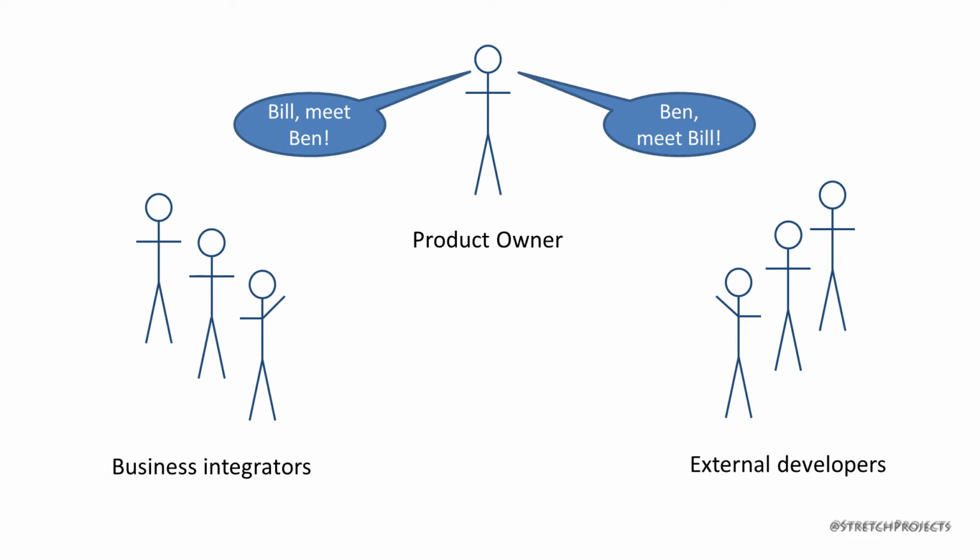If the system has been developed by an outside partner, the handover phase will usually involve developers and engineers from both sides working together, facilitated by the product owner. Other than this, the product owner and the business side of things are not normally involved in any real depth.